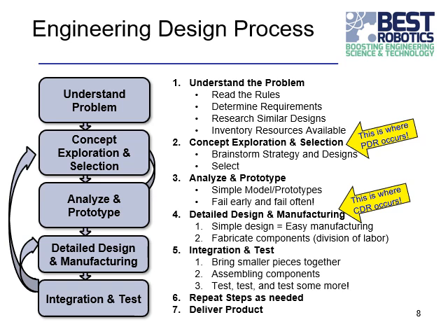And this, again, is you want your critical design review before you're out there actually cutting plywood and cutting PVC and putting things together. So you want to do it with prototypes of where you're at. And looking at building the pieces, we'll talk a little bit more about having a base with your wheels and some kind of manipulator on top of that and seeing how you're going to put that together.